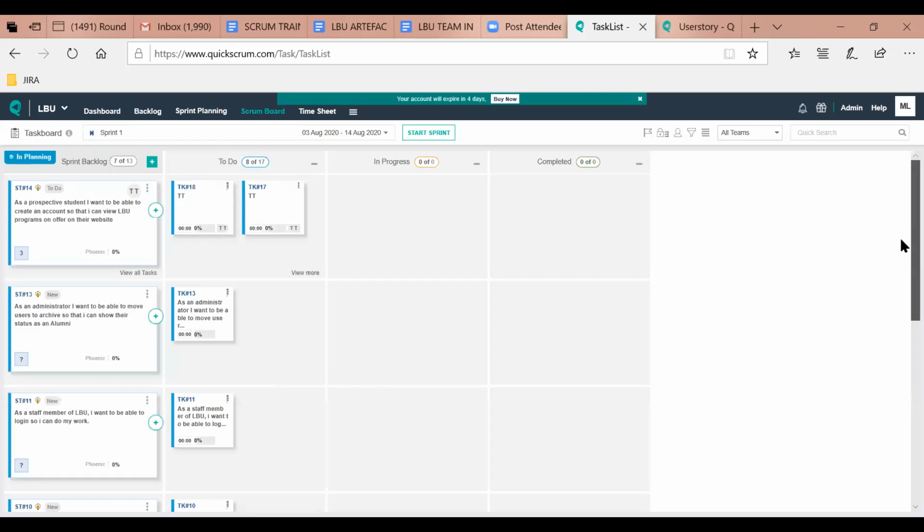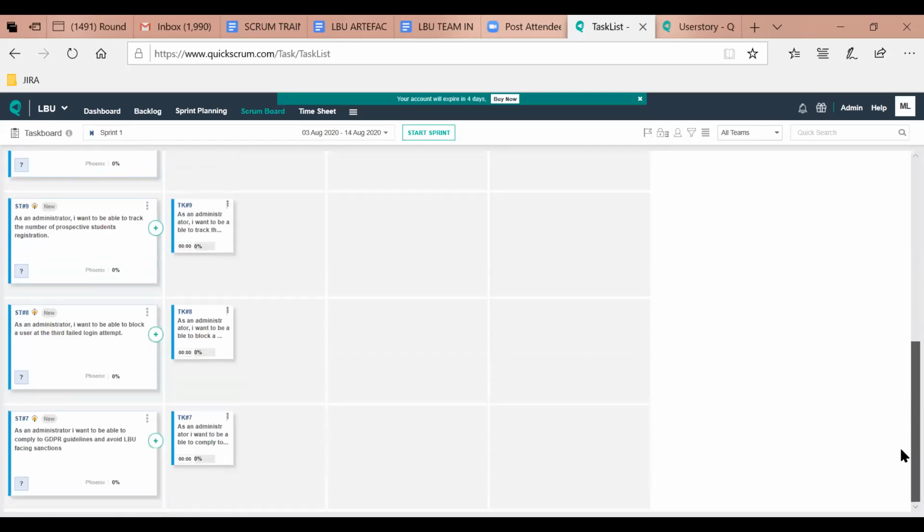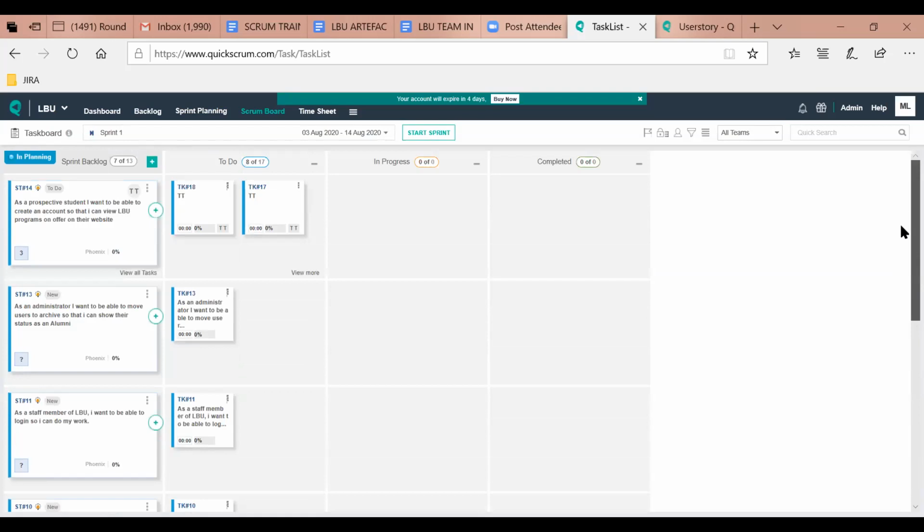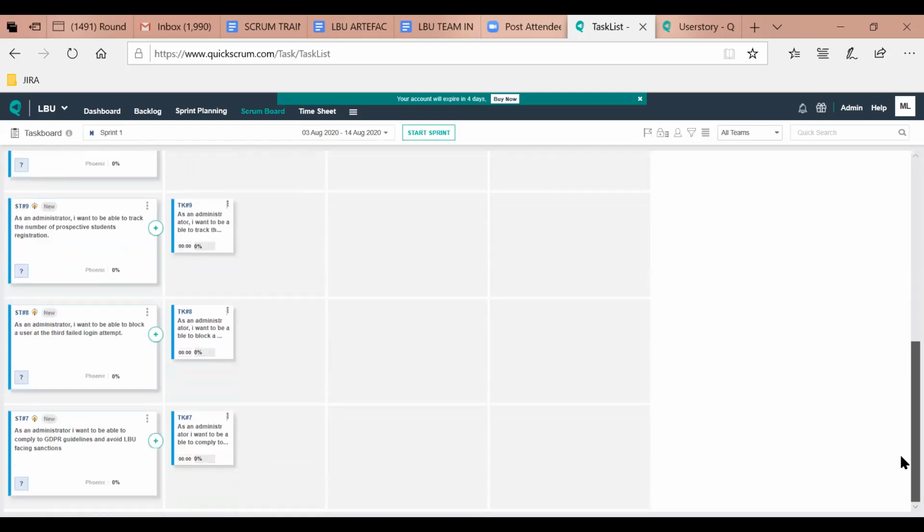Okay, so what we're doing is making an assumption that each story is DOR. We talked about that last time, that every story must be ready before it gets into the sprint. So as part of your sprint planning, while the product owner is saying this is what I want, we are having the conversation and sizing it, because we have an idea of all the things we need to do. We are saying we have to do this, we have to do that. Because of that, I think it's a 5. Because of what you think needs to be done, you think it's an 8.